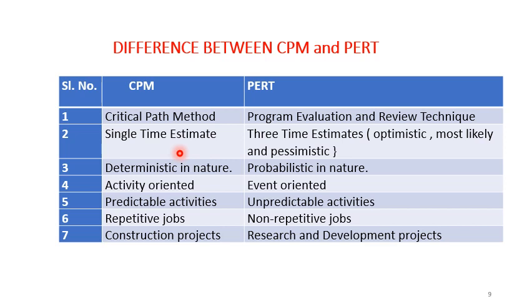So in CPM, single time estimate. Relative to PERT, the time estimation is more precise here. We are talking just in comparison, relative to program evaluation and review technique. In CPM, since it is deterministic in nature, the time estimate that you are using is precisely known relative to PERT. We are again talking in relation to it.